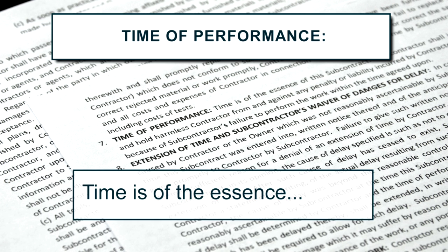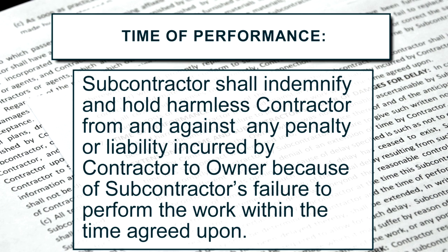Here is a phrase that you'll hear often in the project. Time is of the essence. You will also see that the subcontractor shall indemnify and hold harmless the contractor from and against any penalty or liability incurred by the contractor to the owner because of the subcontractor's failure to perform the work within the time.